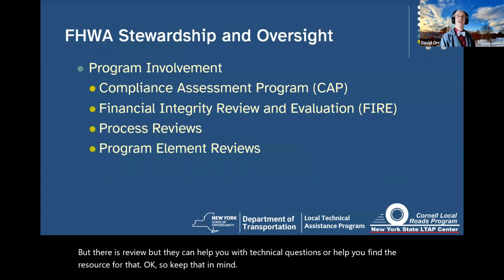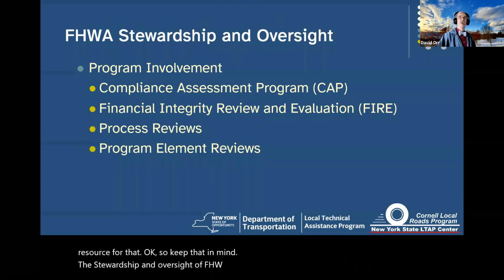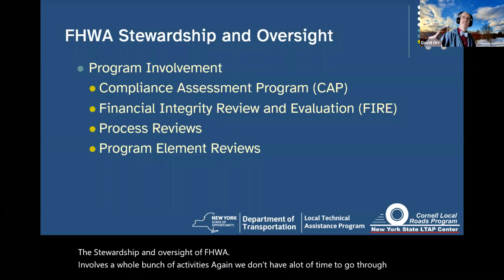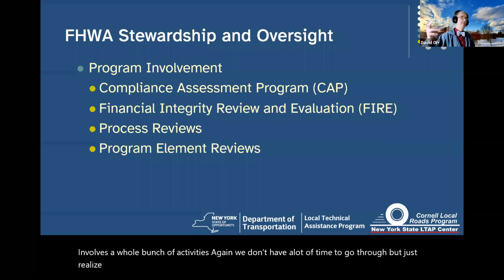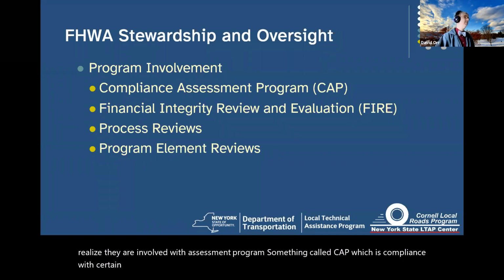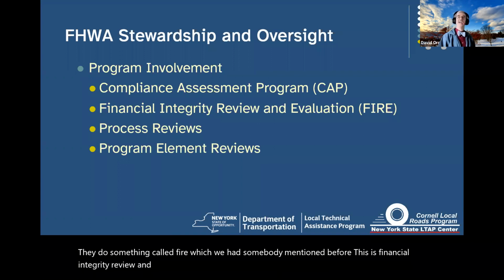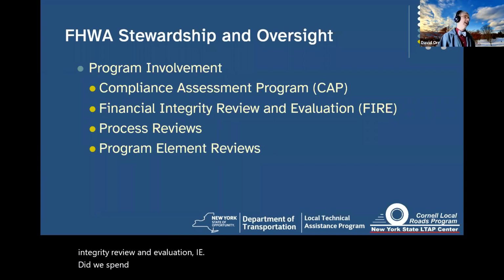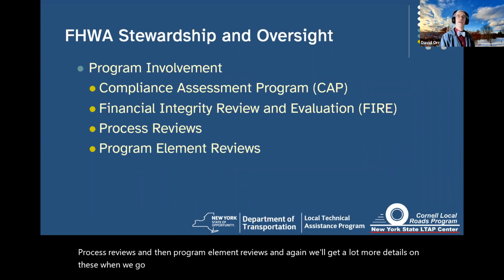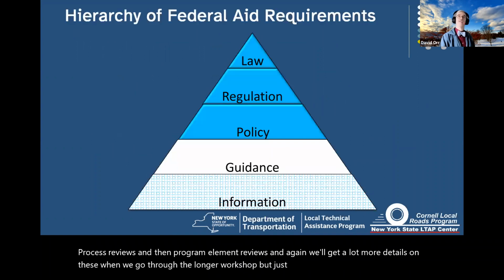The stewardship and oversight of FHWA involves a whole bunch of activities. Again, we don't have a lot of time to go through, but just realize they're involved with assessment programs, something called CAP, which is compliance with certain issues. They do something called FIRE, which we had somebody mention before. This is financial integrity review and evaluation, i.e., did we spend the money in a proper way? Process reviews, and then program element reviews. And again, we'll get a lot more details on these when we go through the longer workshop. But just be aware there's a responsibility for FHWA.